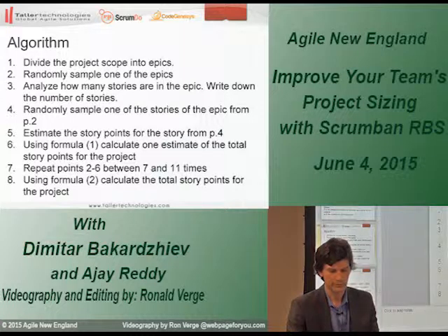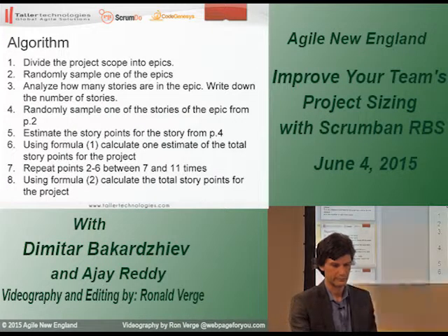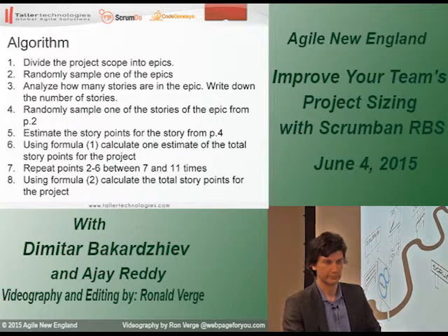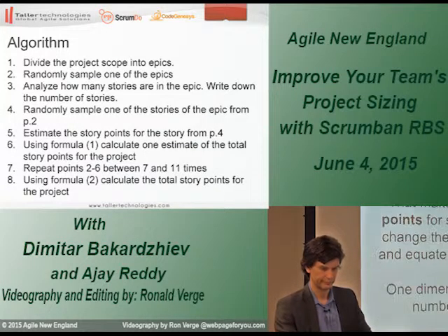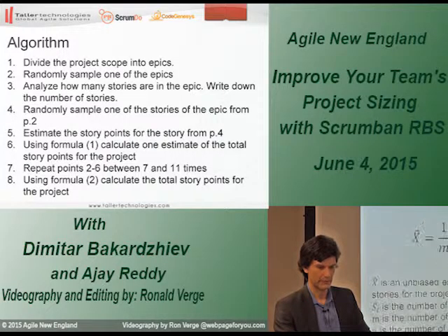Yes. And so the total sum of the work, as I understand it, is identifying the number of epics, identifying the number of stories in the selected epics, and then analyzing the story points or other methodology of those. Yes.